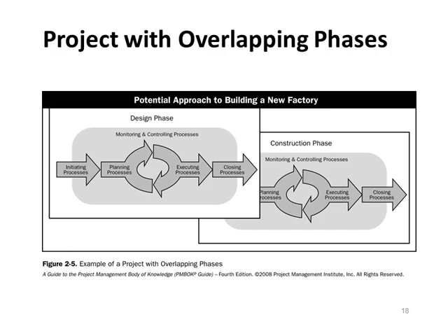Project with overlapping phases. In this approach, the phase starts prior to completion of the previous phase. Here the construction phase has started prior to completion of the design phase. Such overlapping may also serve the requirement of schedule compression, also called fast tracking. And as we know, schedule compression or overlapping reduces time, but it also increases risk.